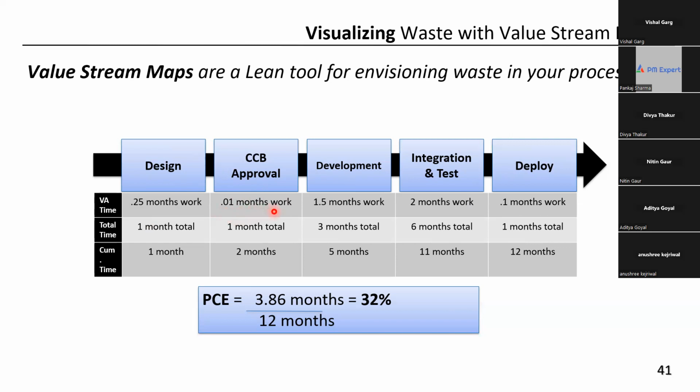Yeah, correct. But what happened, when this change was given to CCB, it remained in the inbox of some important person for some time. Then to collaborate and to call, there were some delays because of some other reasons. Though the change approval took 1 month in total, the relevant time was only 0.01. Are you getting it, Nitin?